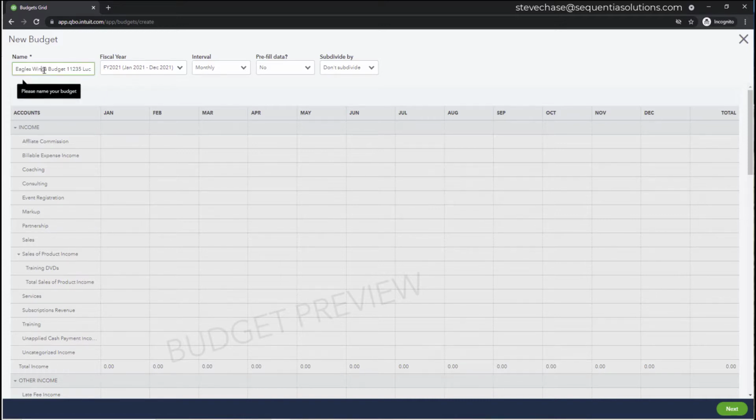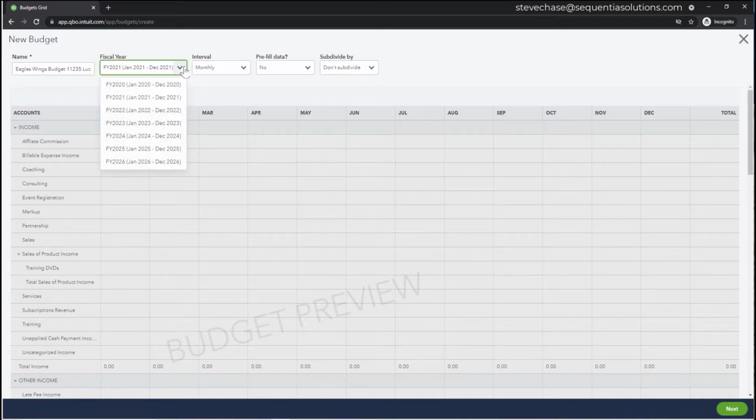Okay. Alright, the next option that you have here is to select the fiscal year. So if your budget is going to cross over a year, it's super important that you begin with the year that the first estimate or purchase order or first transaction begins. So now as I record this, it's 2021, but I expect this 8 months to go into 2022.